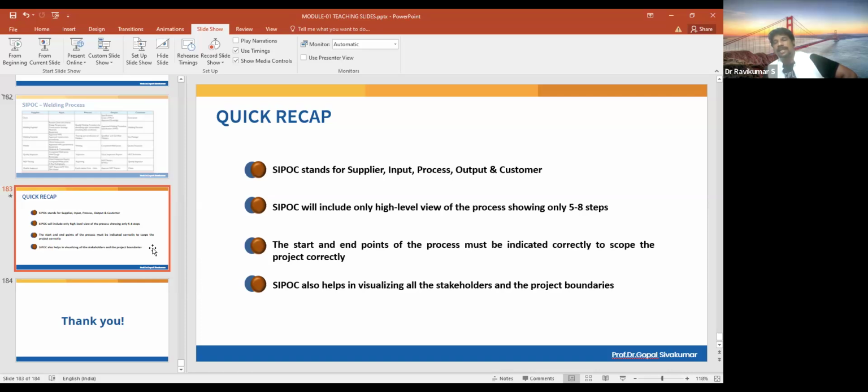So your process will be healthier and efficient. So obviously, this is how you have to prioritize the projects. Then finally, once you have selected the project, you have to convert that into a report, which is called the project charter. The project charter will have 6 elements: business case, problem statement, goal statement, scope statement, timeline, and team members.